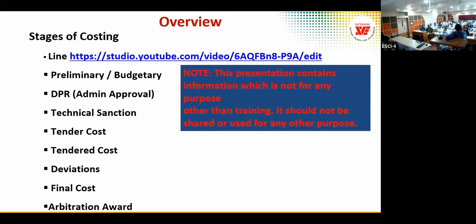Land and approval of design must be gone through before approval of DPR, otherwise that needs additional funds. Yeah, in most of the contracts I'm seeing, the IIT approval is after the DPR, because the department is not sure whether it gets sanctioned or not. So that is the problem.